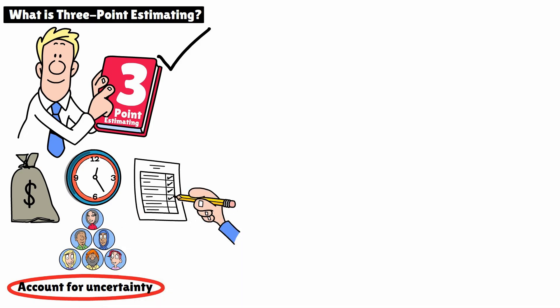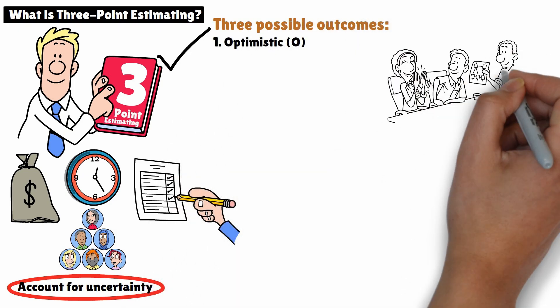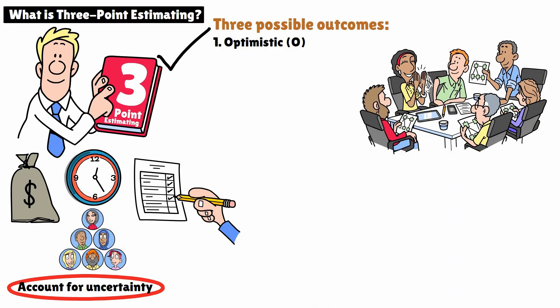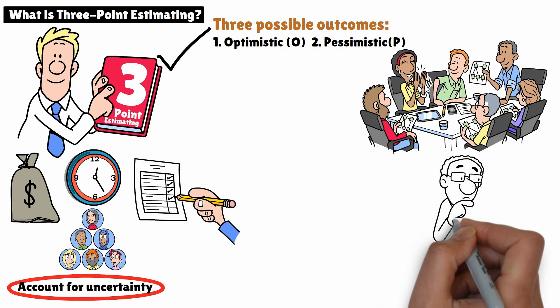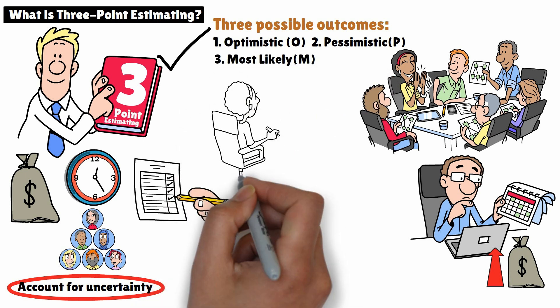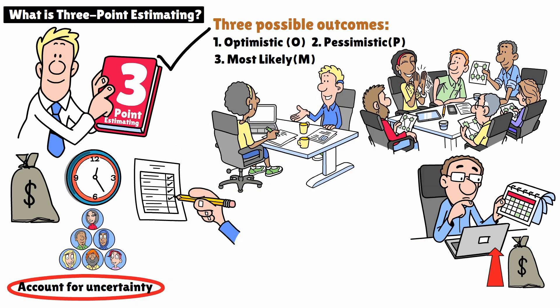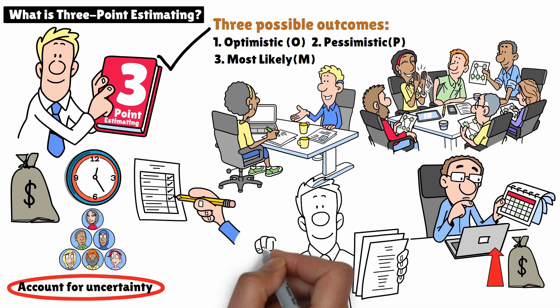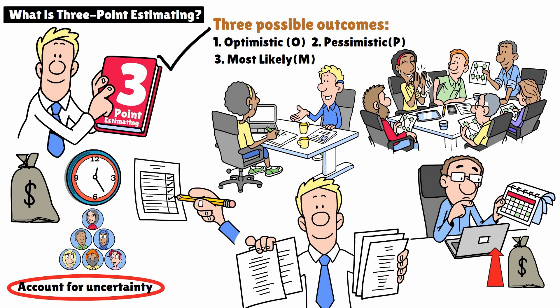At its core, three-point estimating provides more realistic estimates by accounting for three possible outcomes. One: optimistic — the best case scenario where everything goes smoothly without any delays or issues. Two: pessimistic — the worst case scenario where significant challenges arise, causing delays or increased costs. Three: most likely — the scenario that's most probable, assuming normal conditions with minor variations. By considering these three possibilities, you develop a more complete picture of what could happen, which helps in managing uncertainty and preparing more accurate estimates.